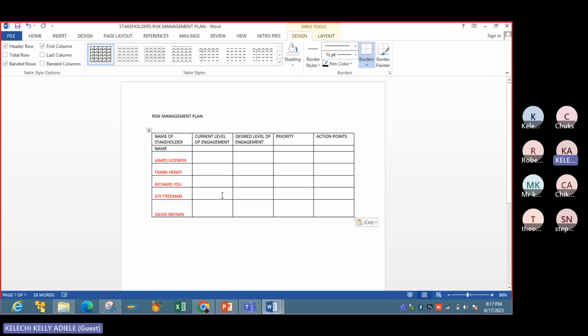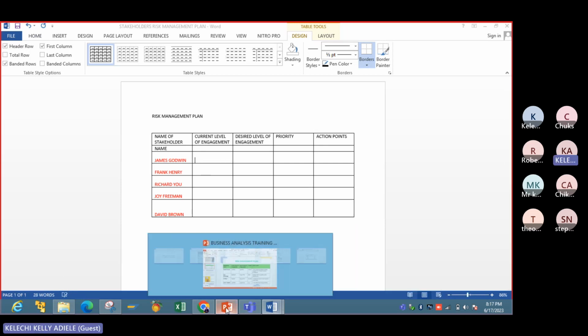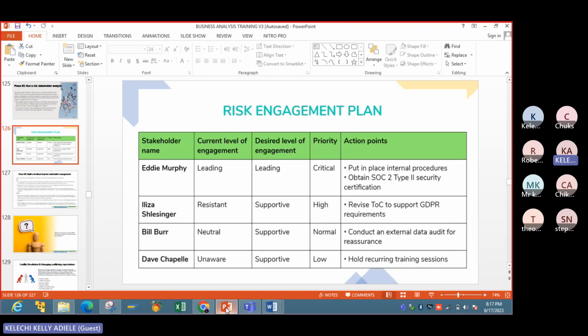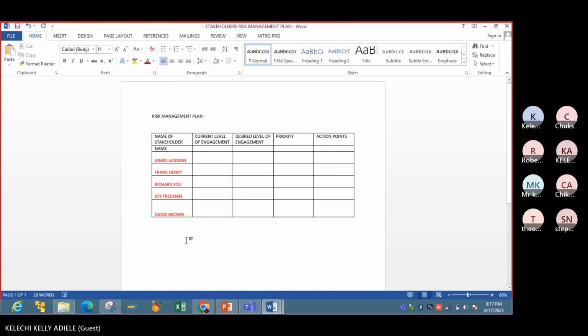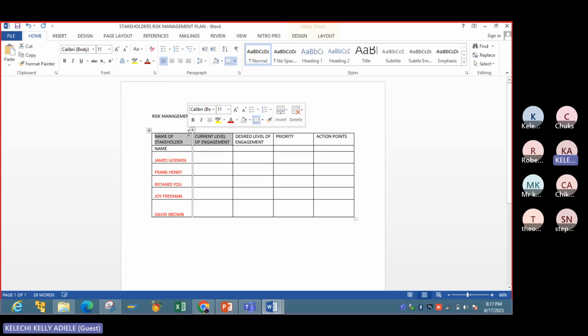Okay, so their current level of engagement, of course, this is the CEO, so I would say, so we have leading, resistant, neutral, and unaware. So let me just do this.